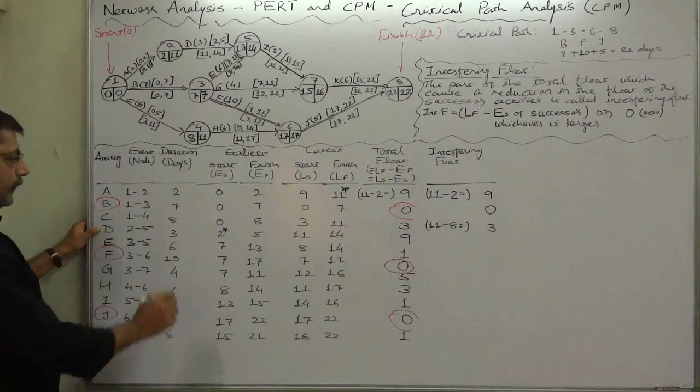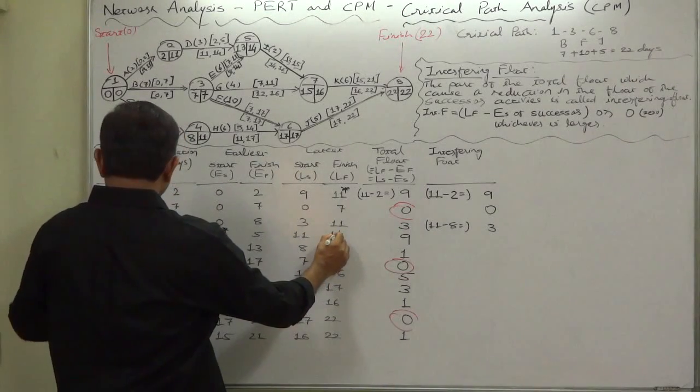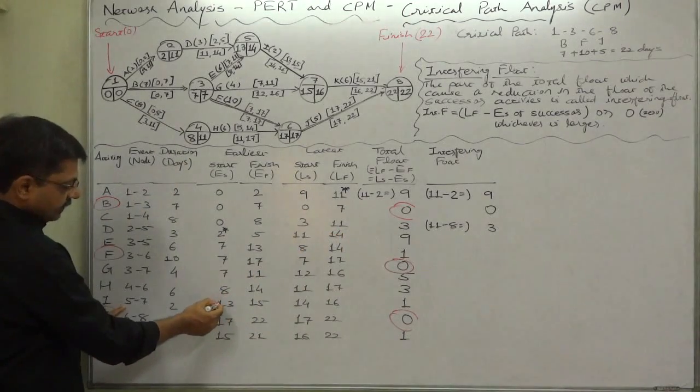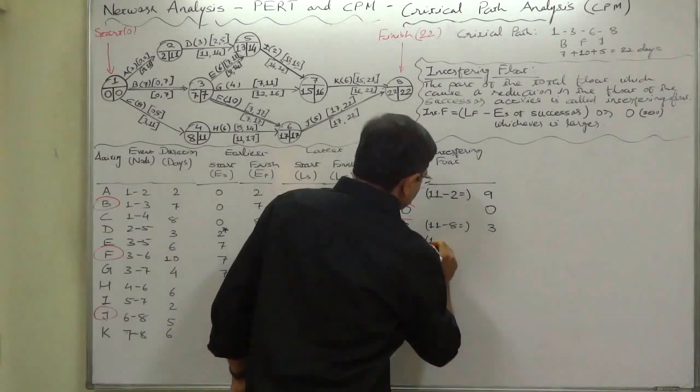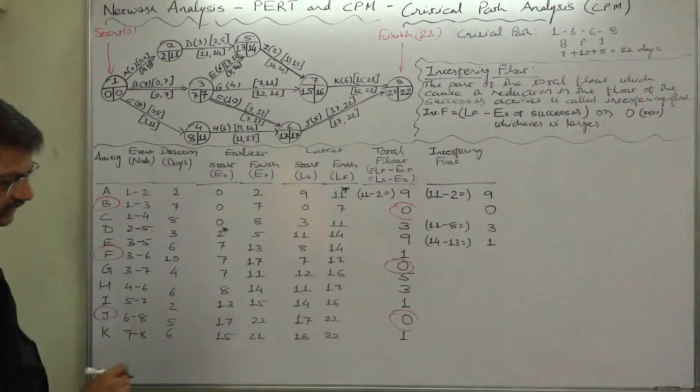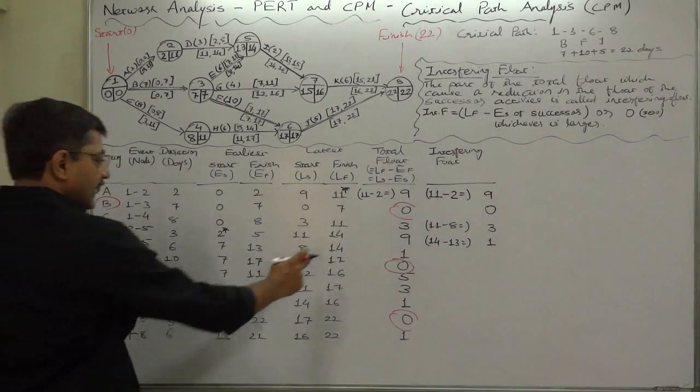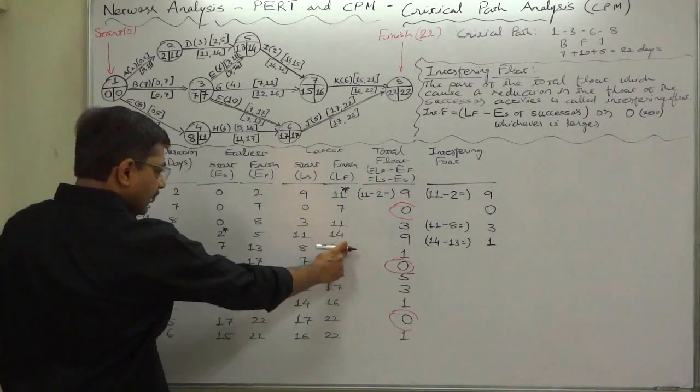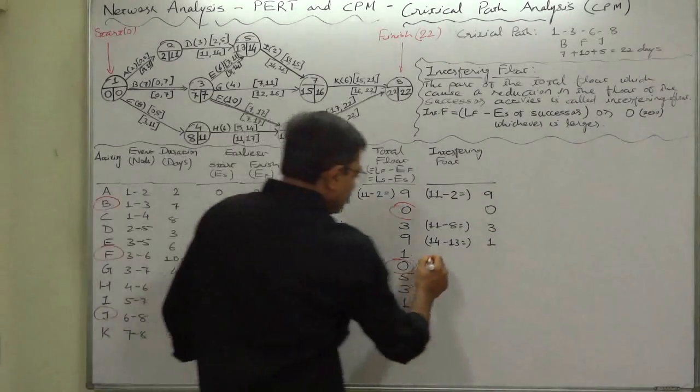Now it is turn of D. Latest finish time is 14 and successor is I. Its earliest start time is 13. 14 minus 13 equals 1. Now E: latest finish time of E is 14, the successor is I, earliest start time is 13, so again 14 minus 13 equals 1.